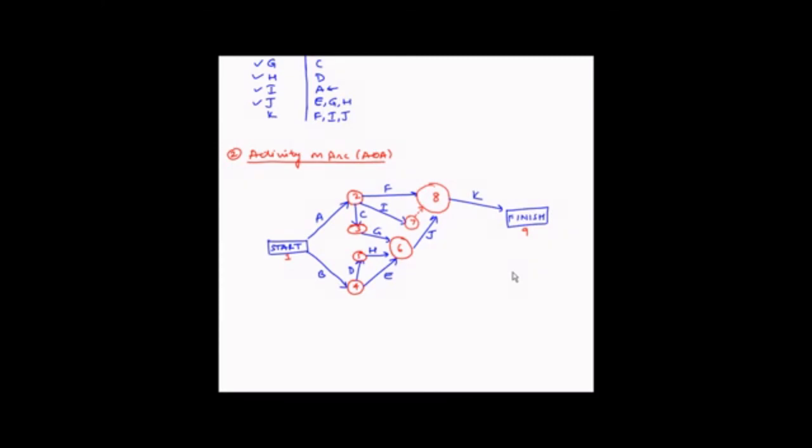In contrast, the AON approach, that is the activity on node approach, doesn't need dummy activities, whereas the AOA approach needs dummy activities. Any of these two approaches can be used in modeling a large project as a network, as this forces the managers to identify the necessary activities and recognize the precedence relationships. If this part of pre-planning is skipped, generally the project would experience unexpected delays.